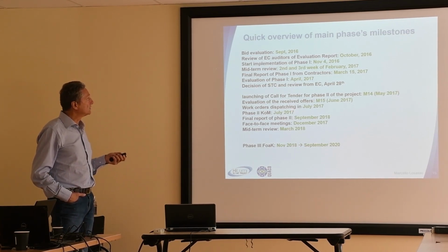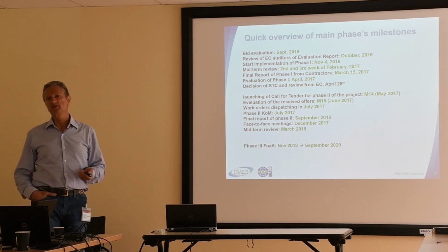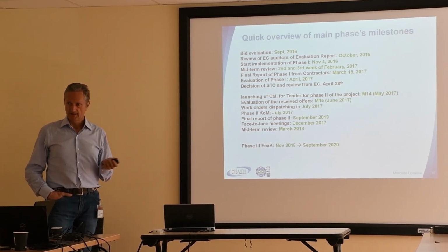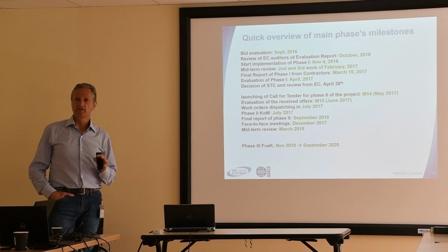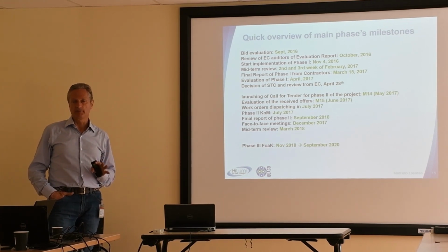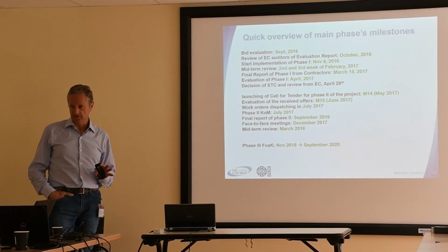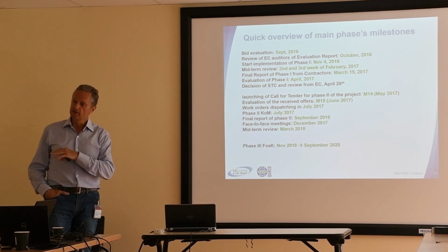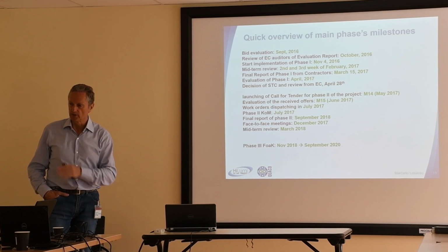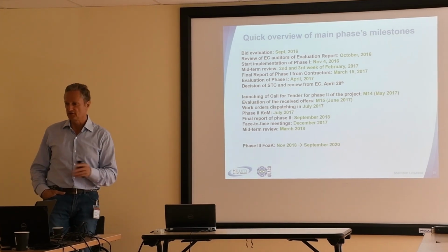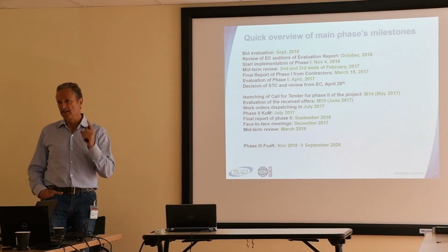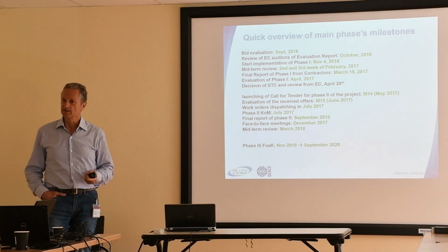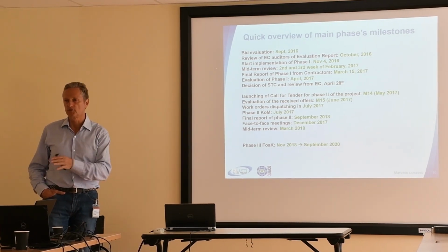The specification is not written here, but it was done at the beginning. As I was saying before, the specifications for PCP are based on functional specs. You will not say, for example, to the company that the roughness has to be done with etching or other things. No, you will tell them, I want a roughness of below 1 nanometer, and then they find a way to do this.